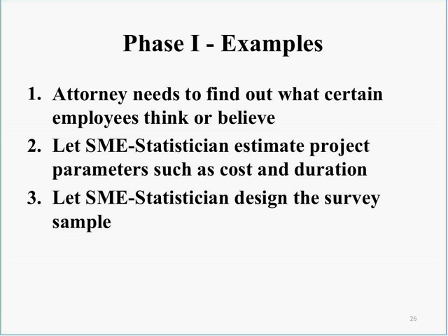Let them send you an email that describes where those costs and the durations come from. If he says it's only going to take a week, or it's going to take a month, or it's going to take several months, you want to know that. And of course, the more data you collect, the longer it's going to take to complete the project, because you've got all that data to analyze and present and develop a report.